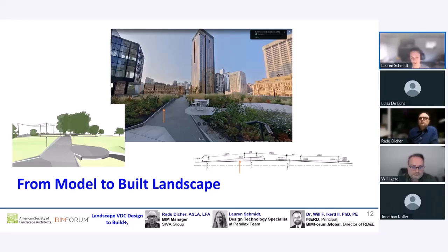So yeah, I would say there's no perfect solution for some of that stuff, and some of it is just trying to make sure it's clearly outlined in your BIM execution plan. Like this is where scopes are split. We might be modeling some of this stuff for coordination or for visualization or even just for convenience for ourselves.